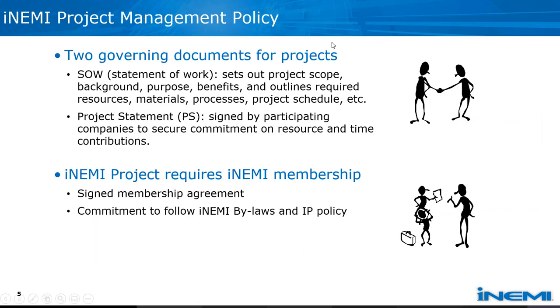We have 2 governing documents for the project. One is the SOW, the statement of work. It sets out the project scope, goal, purpose, benefits, and outline. The other document is the project statement, the PS. This contains the information management and processes to secure the contributions to the project.